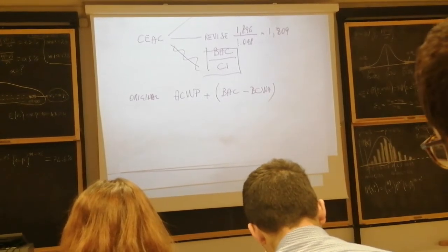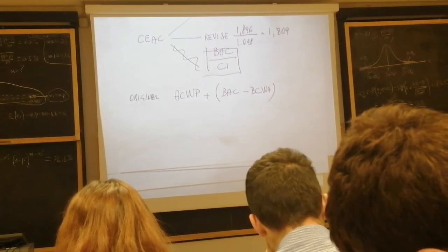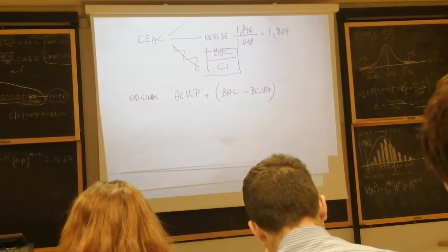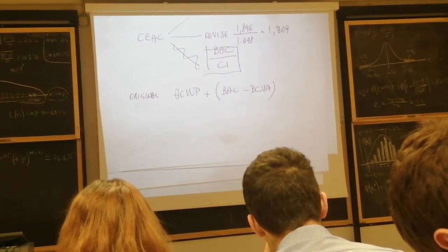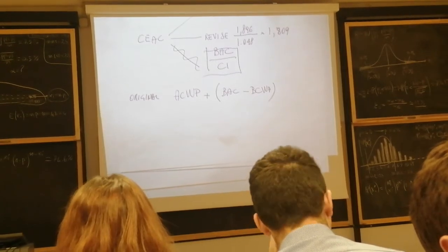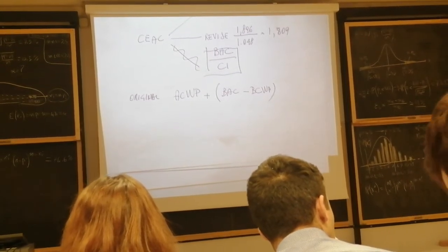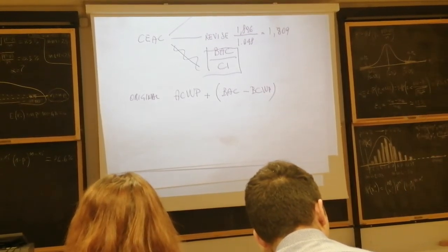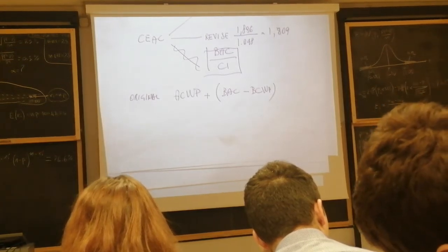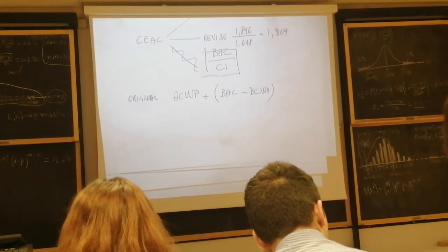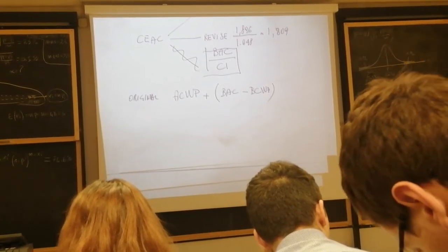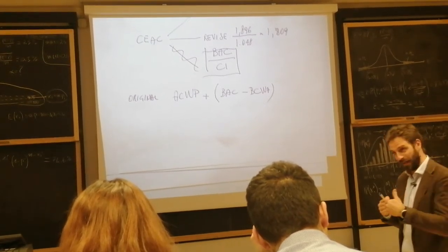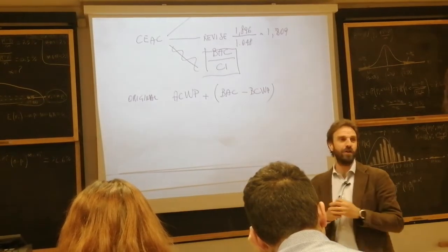You get the idea? Think about it. Remaining budgeted costs. So we are thinking that we were very bad in the past so far. What's spent? It's spent. ACWP. But starting from now on, performance will get back to 100%. No losses. No poor performance. What is the work remaining? What do we need to do in the work remaining? At budget value is what we did so far in terms of budgeted cost of work performed. It's the earned value to complete the original budget.